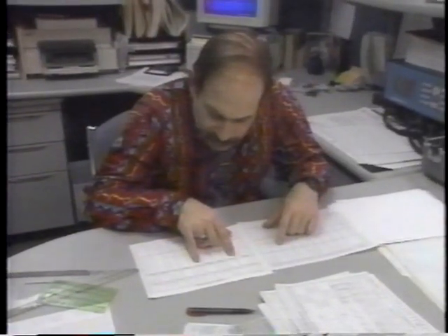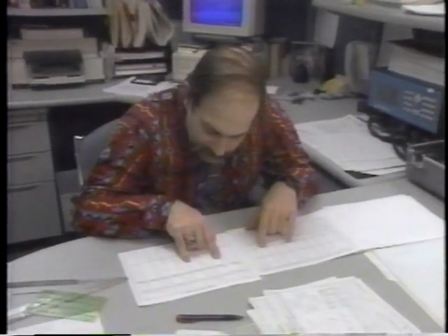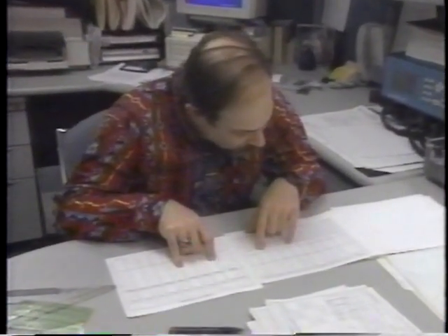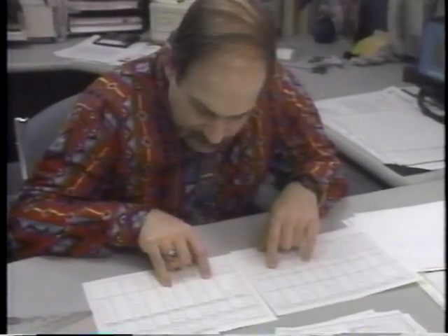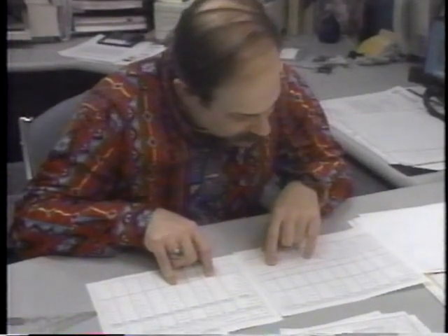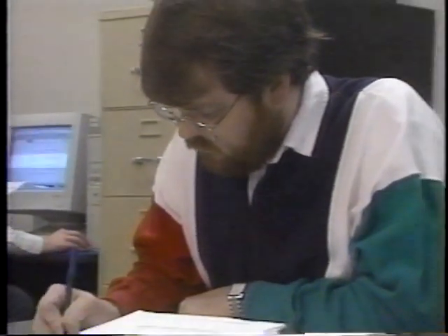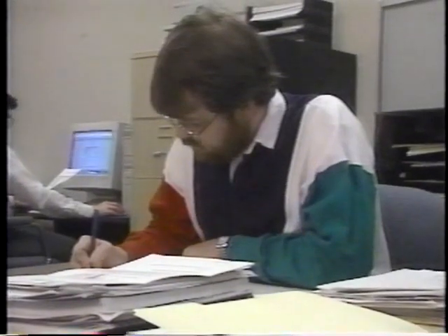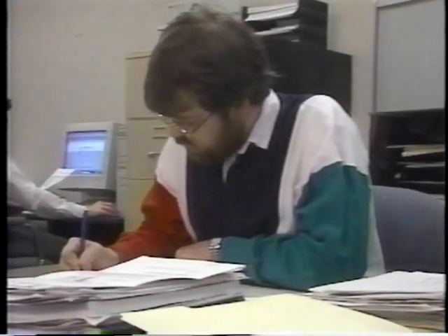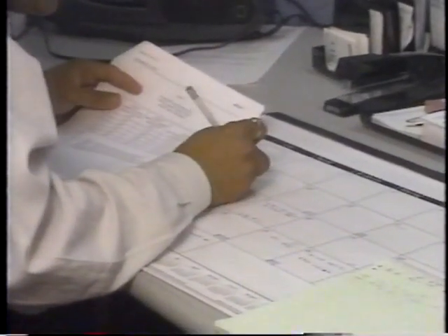The recommended procedures are based on determining manpower requirements for 12 calendar months. It may be better for an agency with a 2-week pay period to adopt a system that uses calendar months, 12 per year, for future year programs, and 4-week periods, 13 per year, for current year programs.